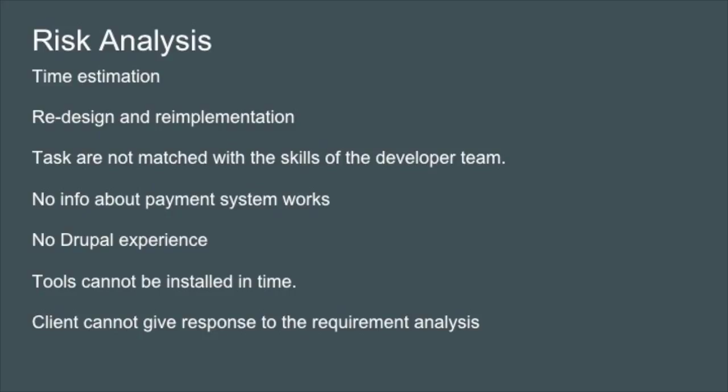Another issue we'll be facing is that the allocation of the tasks is not matched with the skills of the developers. For instance, no one in our group has any Drupal experience, and that can cause the overdue of the original plan schedule. Based on low information on how the payment system works, the reservation functions might be at high risk. Some more issues are the development tools being troublesome to install and the possibility of clients not being able to participate in the requirement analysis before the response is due.